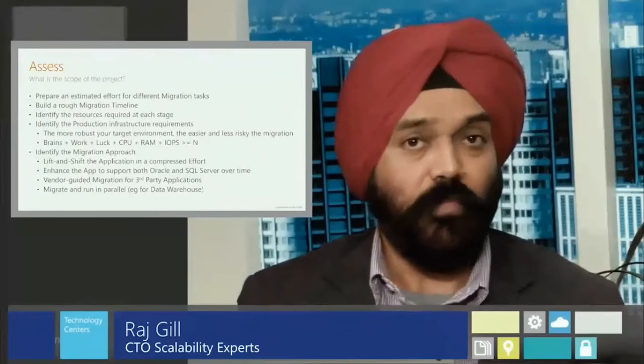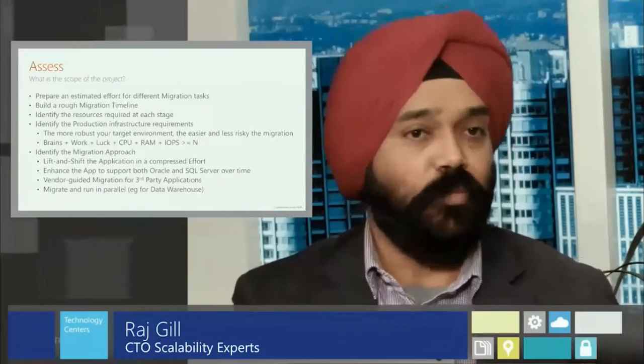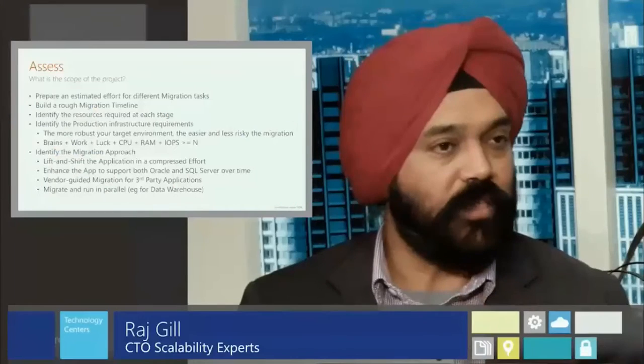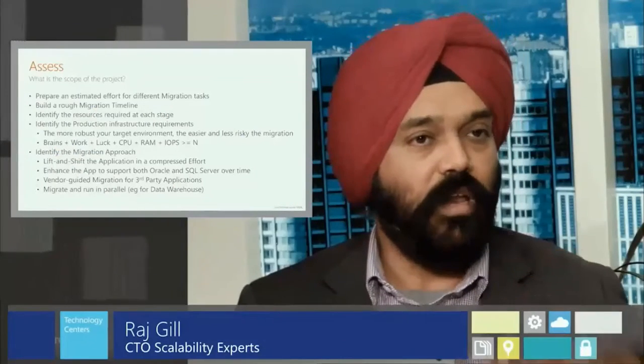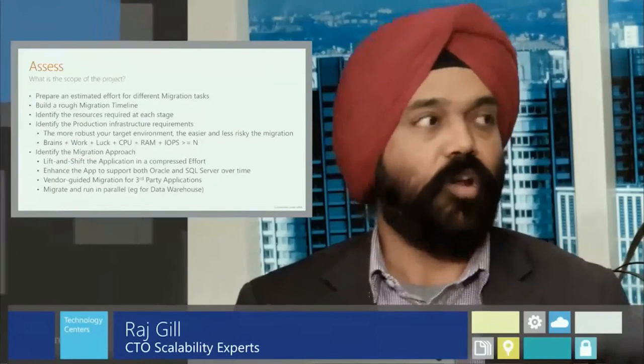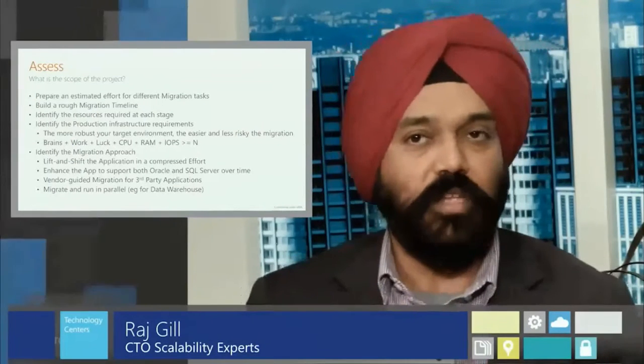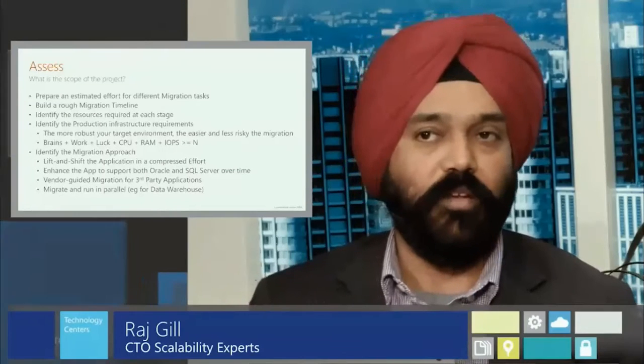The other thing is that if you're using third-party applications, for example, you want to make sure that the application vendor supports SQL Server. And you also want to make sure that if you have done heavy customization, that you take that into account in terms of how that customization will be migrated to SQL Server. And as I mentioned earlier, Oracle comes in very different flavors. You have a data warehouse implementation, you have a RAC implementation, you have an Exadata implementation. Each one has its own complexities, and you want to make sure that you really identify clearly. Don't go and tackle the more complex ones initially, tackle the easier ones and learn your way, and then you're better prepared to move forward.